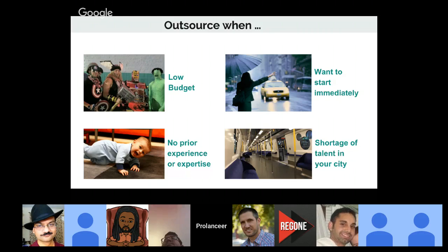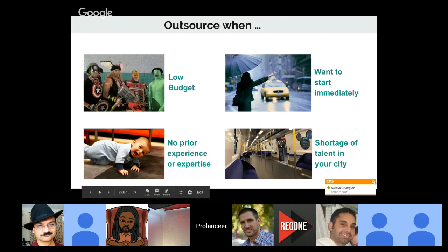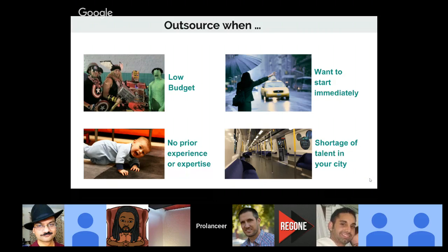So, like I said, just reach out to many people and see what they're responding. Ideally, and there is one more thing, which is called poker estimation in agile development. It's like the project manager is talking with developers, and everyone is estimating some feature without knowing others' estimation.